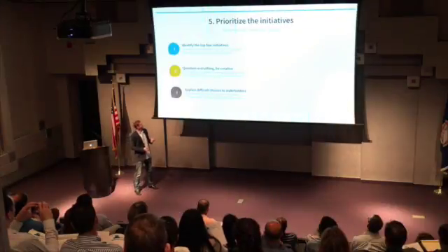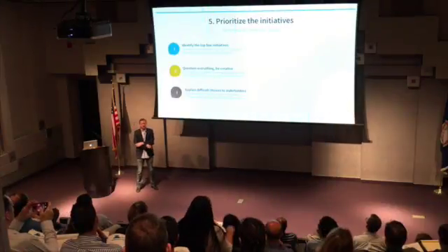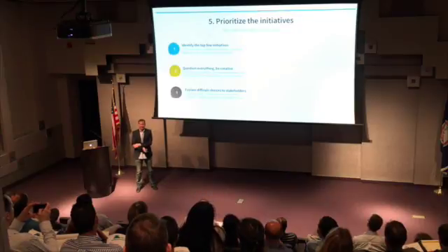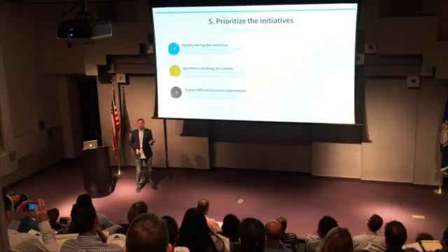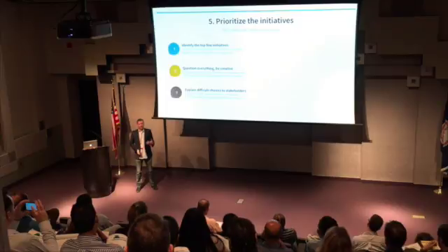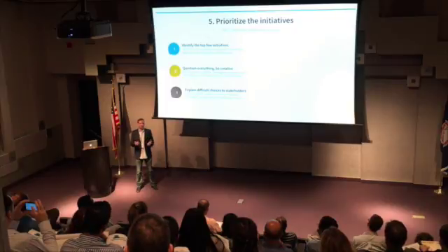And then the last part is you do have to explain the difficult choices to the stakeholders. But having gone through the rigor of a process like this, you can say, hey, look, I understand what the issue is with the product. I know what you think that the product needs to be. I know what the product currently is, and we agree on that. I've proposed a solution that you also agree with, that is the right solution to go close this gap. The reality is we don't have time to get to that solution right now. We're going to have to defer that for a couple of quarters. And what that means is I just need you to hold the line for now.